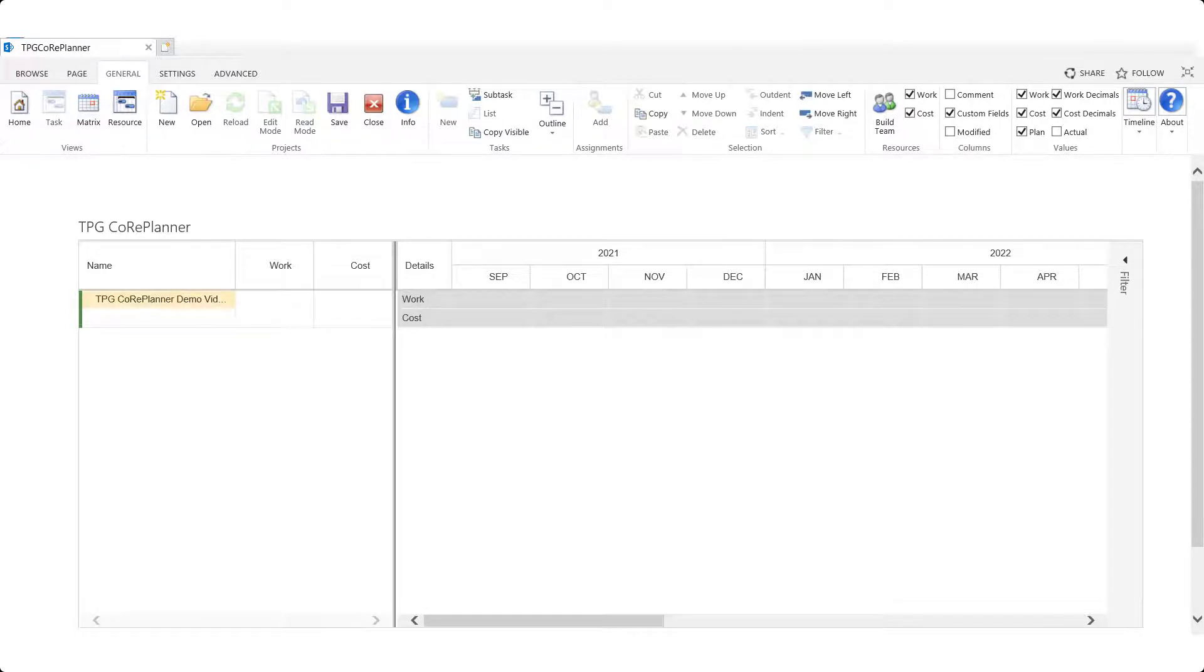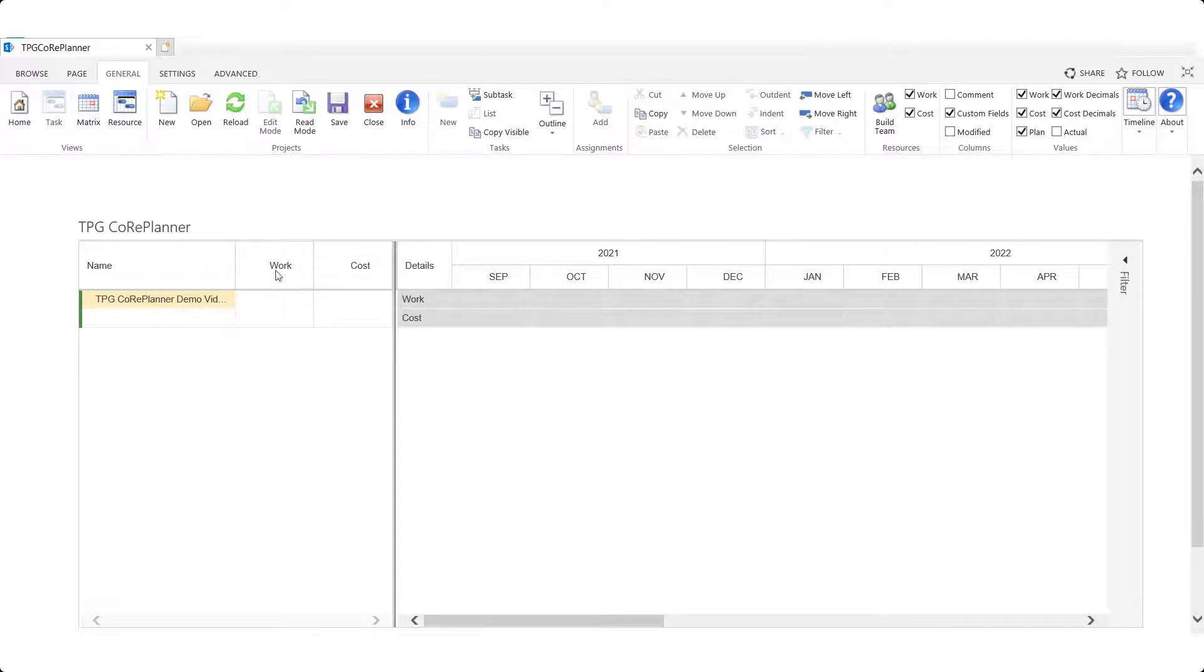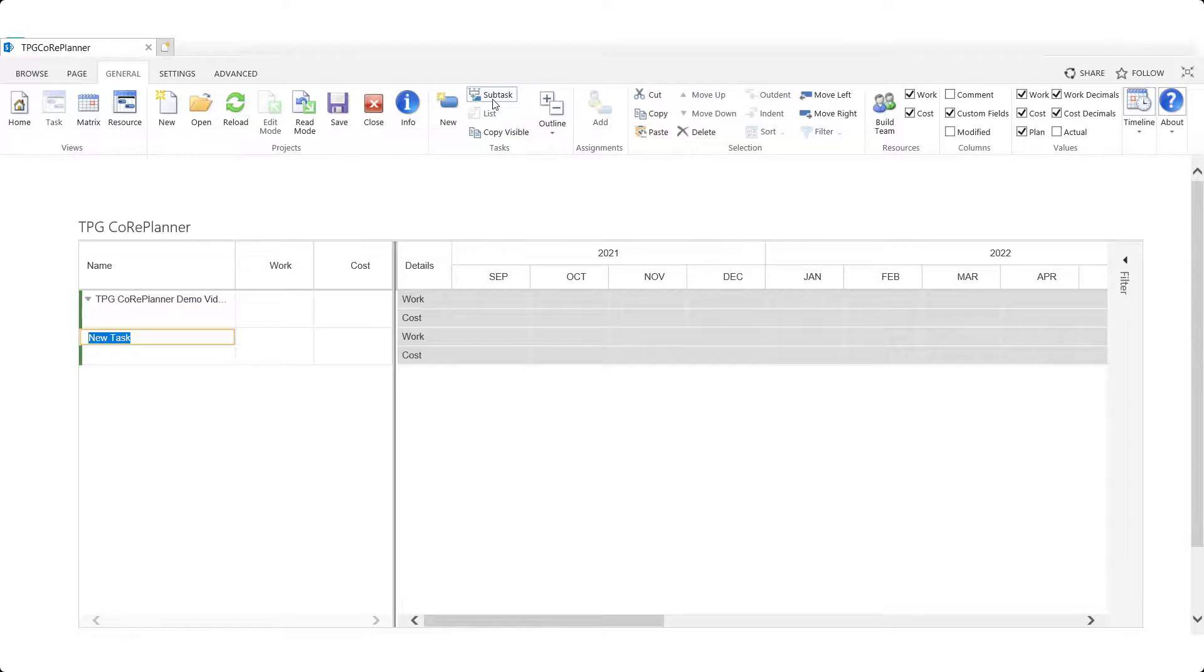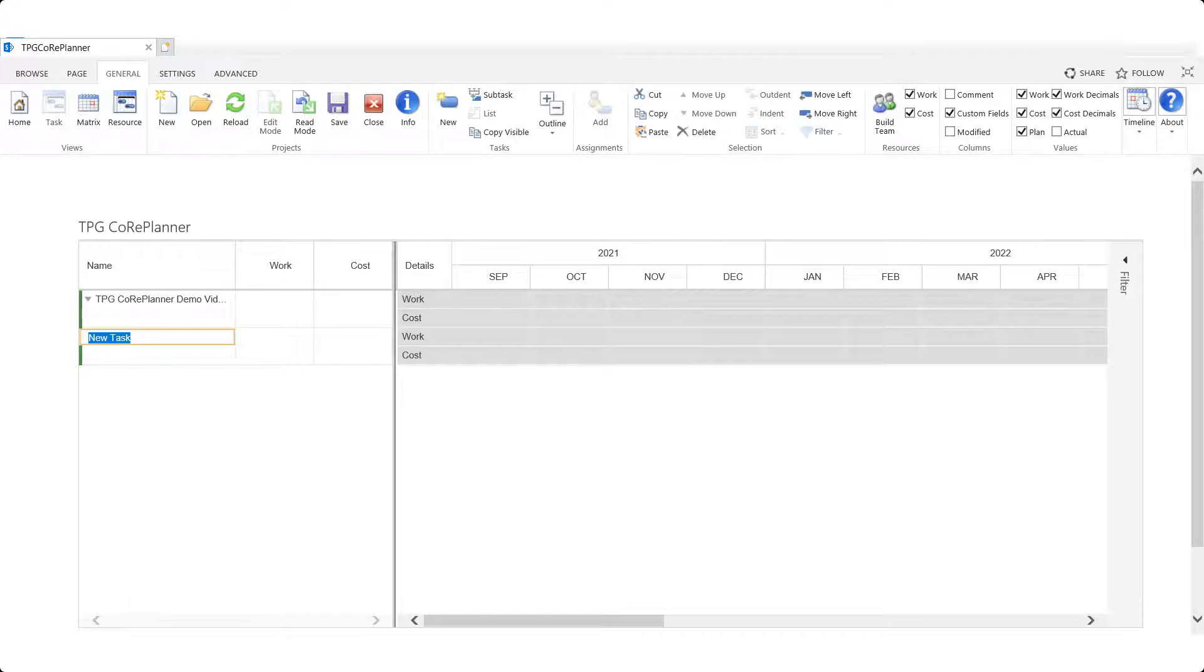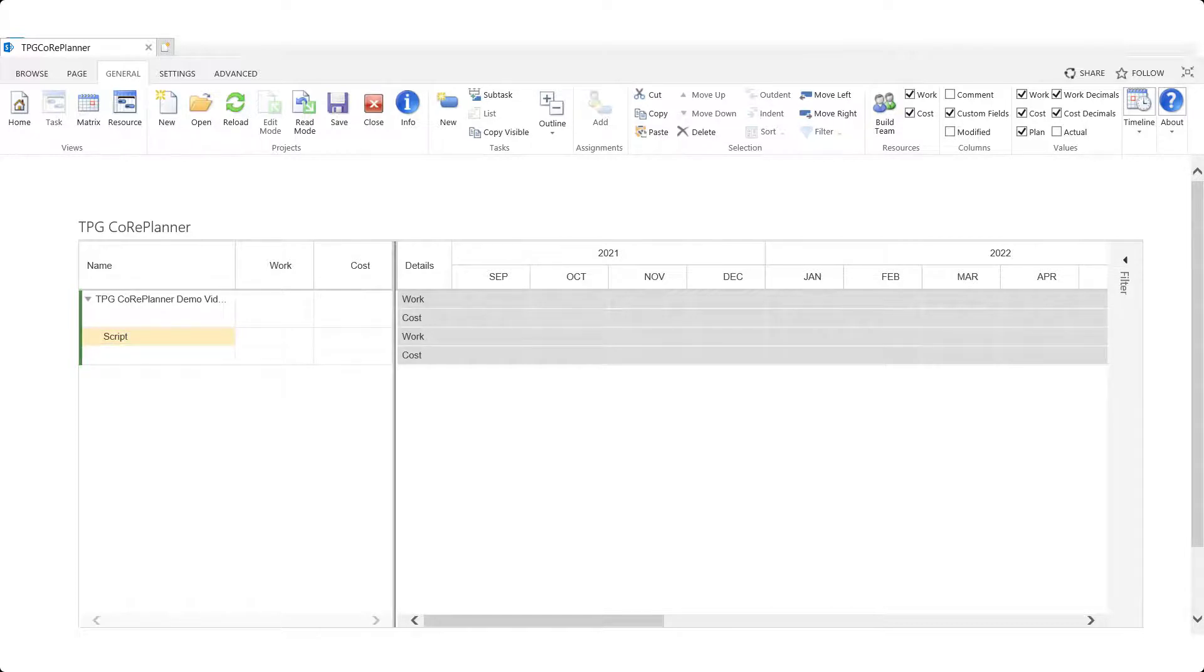Next we'll create tasks under our project summary row. This is the row that displays the name of our project. We need to select the summary row and use the new subtasks button found in the task group of the general ribbon. This creates a new task whose name can now be edited. Task names can also be edited by double clicking them.